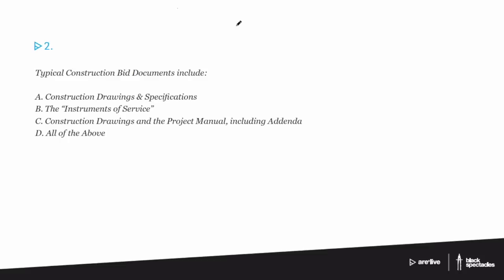A typical project starts, goes through SD — schematic design — then DD — design development — then CDs, then a bidding phase, then construction administration, and then an end game of warranties and other issues. The contracts will have these five main categories built in, and you don't have to do all of them. Some owners say they'll be fine with construction and don't need you for that part, or they might only want DD and CDs. But the standard is you're going to do all five plus the beginning and end.